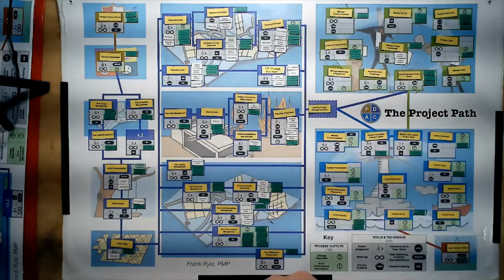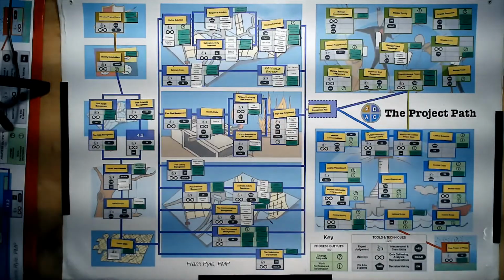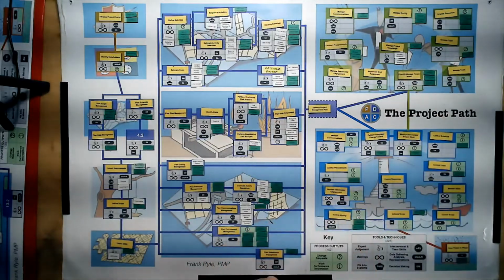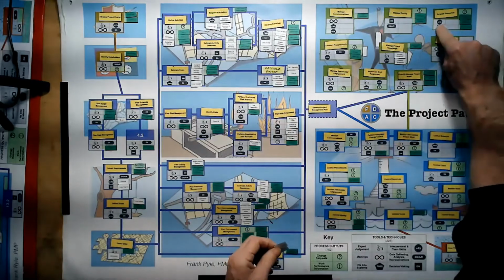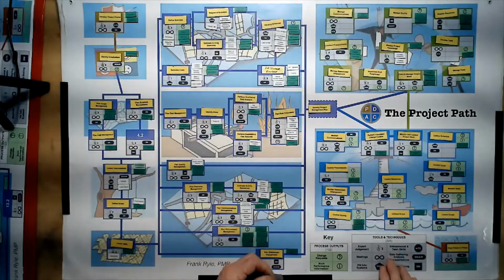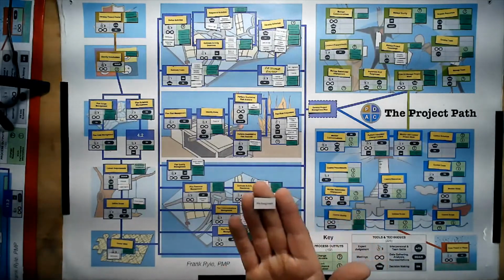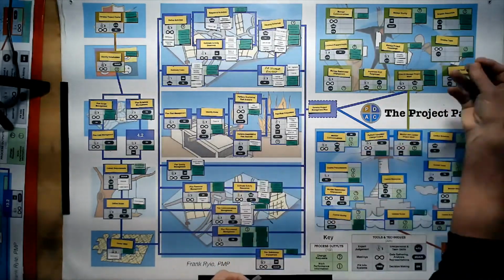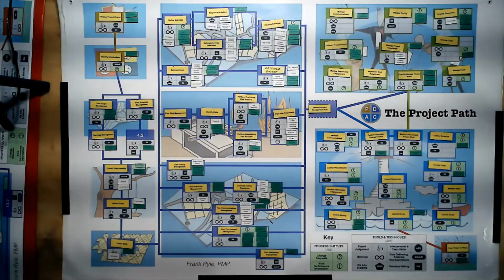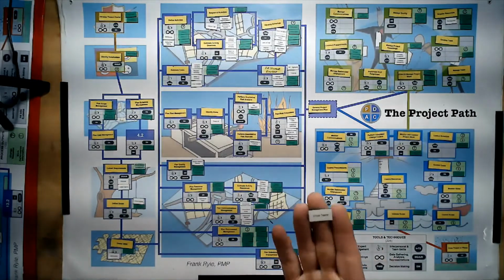So let's have a look at the resources now, for example. Let's go have a look at acquire resources. You can see here we have interpersonal and team skills, of course, as we would have here. And decision-making might help us. But we also have pre-assignment. This has always been around in the PMBOK, and there were things in previous PMBOKs that were always pre-assigned. They've already been assigned to the project, so therefore there's no decision needed.